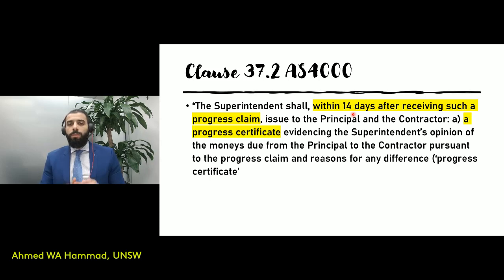Now, as I said, these provisions do not reflect the requirements that are set out in the Security of Payment Act. And as we all know, it's always important to stick to the Act. So the Act dominates any of the other provisions in standard form contracts. But AS4000, as I said in the example, demonstrates the number of days that a superintendent needs to abide by when submitting their progress certificates to the principal and the contractor.